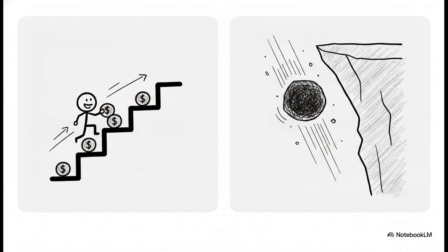But for losses, oh man, it is a sudden, immediate drop off a cliff. If the math shows a job is going to lose money, accounting principles, specifically the conservatism principle, dictate that you must recognize the entire foreseeable loss immediately. We never, ever defer bad news.